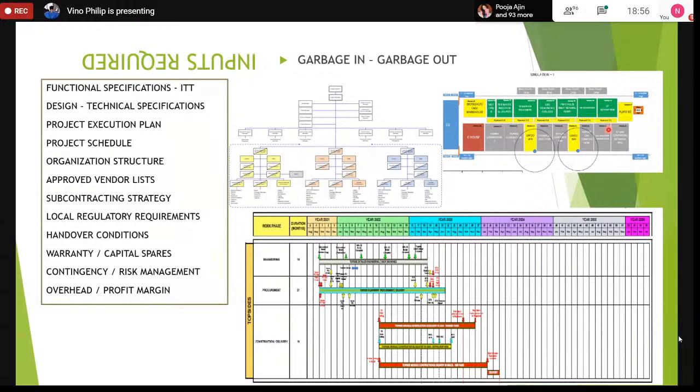And the gray ones, let's say, are done in China. So we issue these in China. The reason may be because these are considered a little more advanced, and we don't expect the capacity in Brazil to be able to handle the pressure rating and the different risk factors when manufacturing these particular modules. Because they are compression modules or power generation modules, we expect them to be a little more complicated and beyond the capabilities and capacity of certain Brazilian engineering companies and fabrication yards.